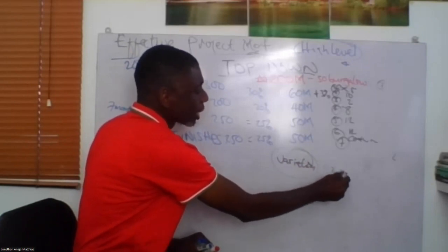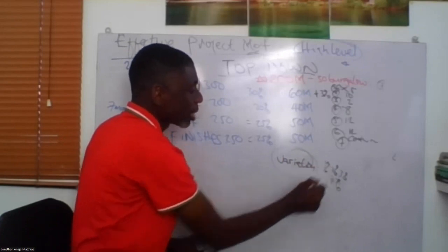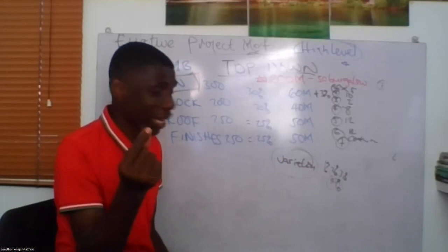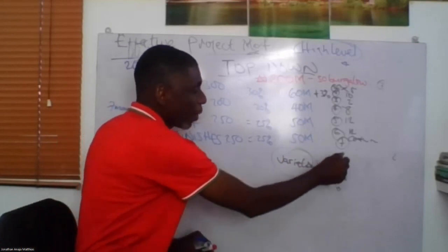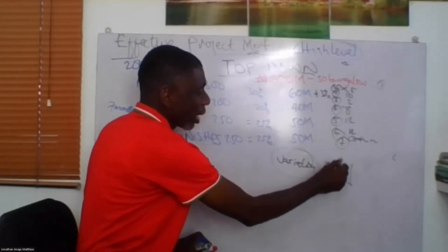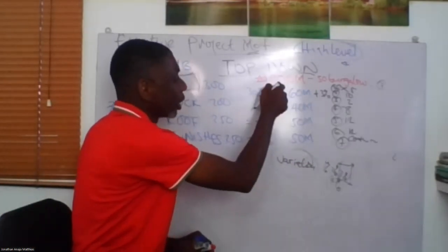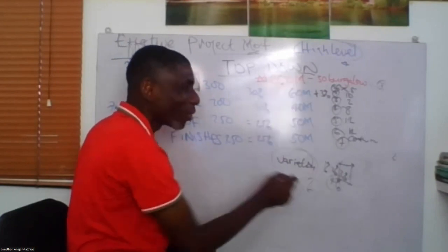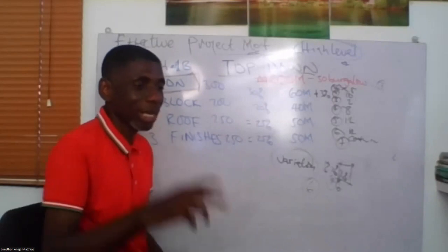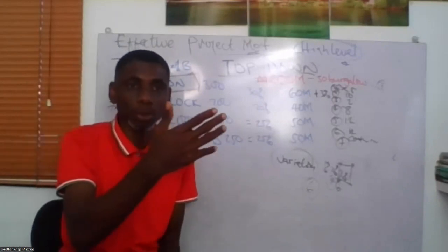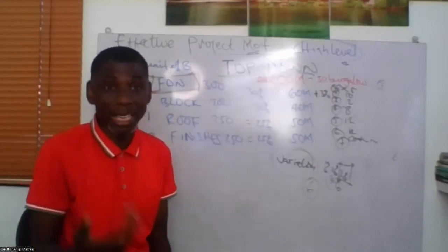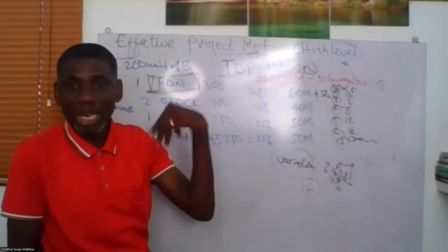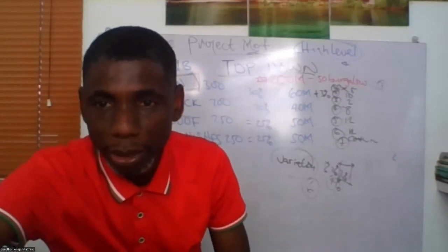Now, variations are not very encouraged. Sometimes it's actually a fact for a project, but they can be very meager. So what you should now do is carry the variations of past projects and tell your accountants that if this is our project budget, remove 3% of this and keep it as contingency reserve. Nobody will question that you just brought it from your head, because you brought it from experiences that you have had in past projects. So this is a top-down estimate, and this is how it relates with analogous estimate.